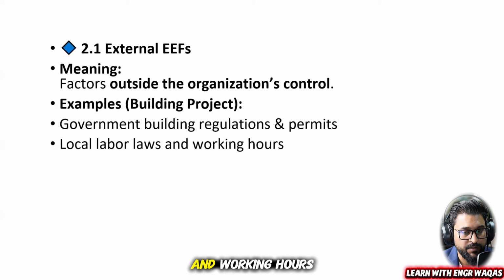Local labor laws and working hours, like in UAE: in the summer months, they are not going to allow you to work beyond about 1 p.m. because sunlight is too much, right? So when you are operating in UAE, there is a labor law you have to follow. So you are going to cut down those many man hours or working hours in every summer month. Like May, June, July. These months are peak temperature months.